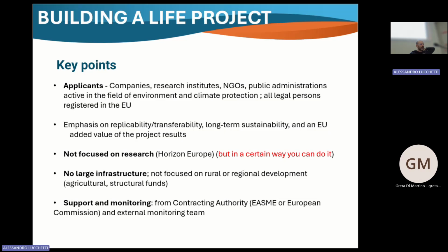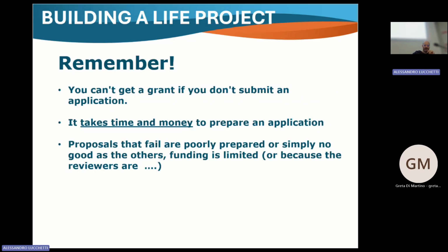I remember that in a project I had to cut one of the partners because they had very big problems, and I asked the monitoring team for the procedures, but the final decision to officially cut a partner is from the European Commission. So the very big decisions are from the European Commission, not from the monitoring team.